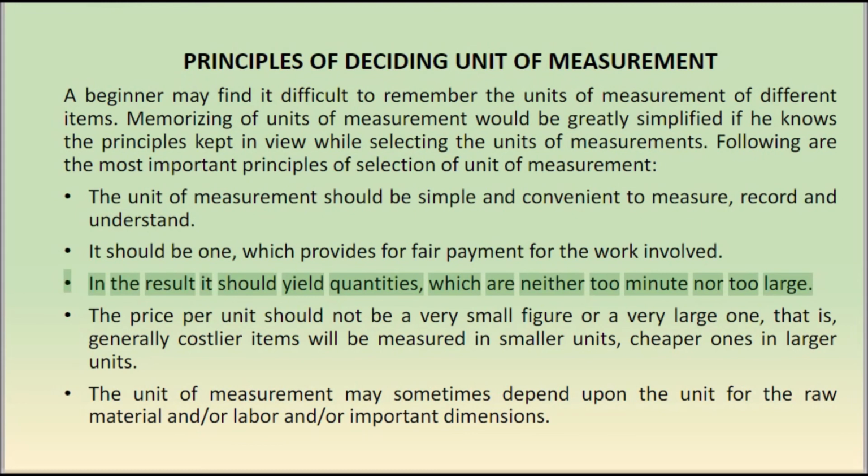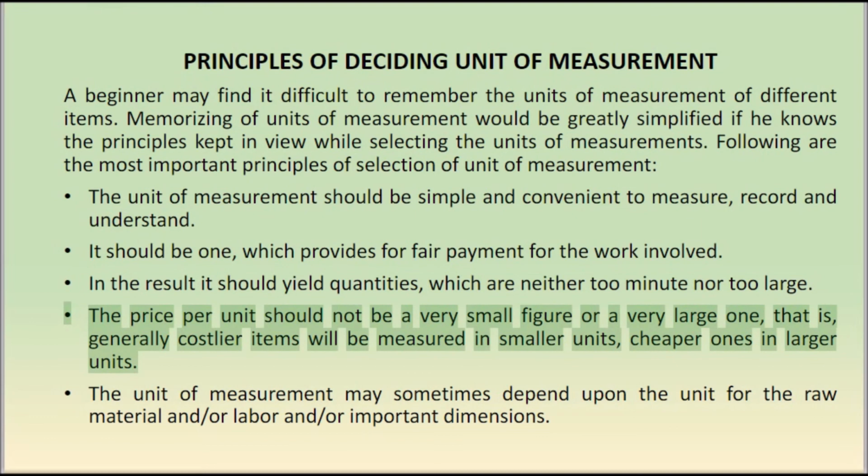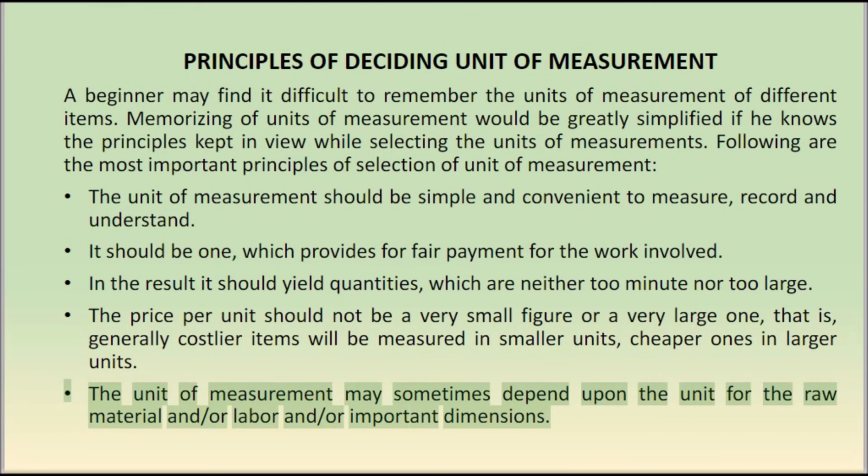The price per unit should not be a very small figure or a very large one, that is, generally costlier items will be measured in smaller units, cheaper ones in larger units. The unit of measurement may sometimes depend upon the unit for the raw material and/or labor and/or important dimensions.